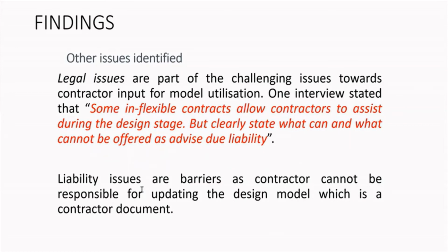They can assist during the design stage, but the contracts clearly state what they can and cannot offer as advice due to liability. So they have to limit what they can offer. However, some contracts are flexible. This liability issue becomes a barrier for early contractor input into the design and construction model.